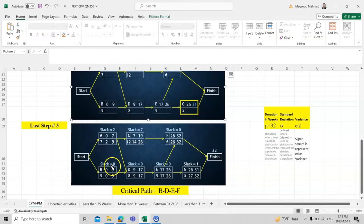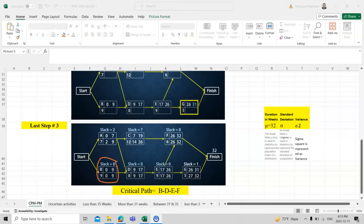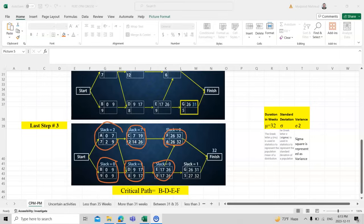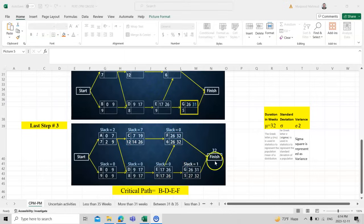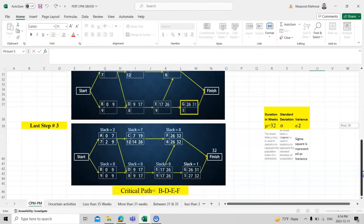Tasks with slack zero are the critical tasks. As a project manager, I cannot bear any delay in these tasks: B, D, E, and F all have slack zero. Task C has a slack of 7 weeks — a delay there won't affect the overall project duration. Task A has a slack of 2 weeks, and Task G has a slack of 1 week. Tasks with slack zero form the longest path — the critical path.